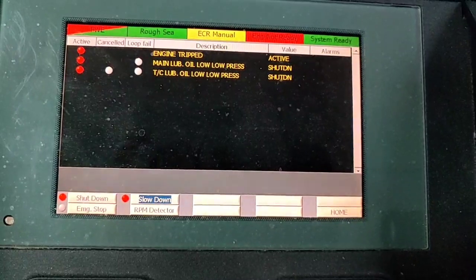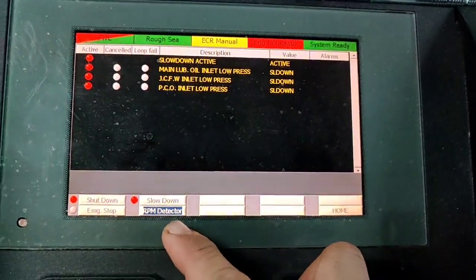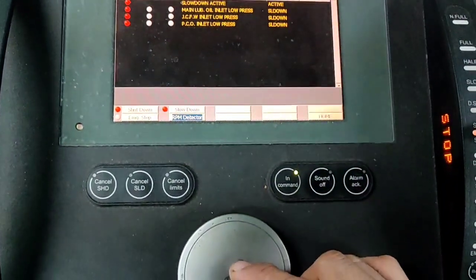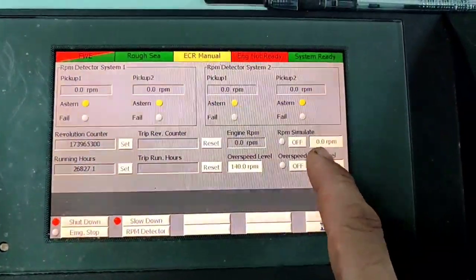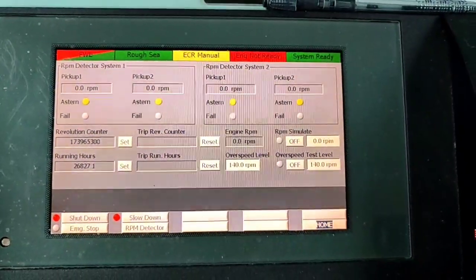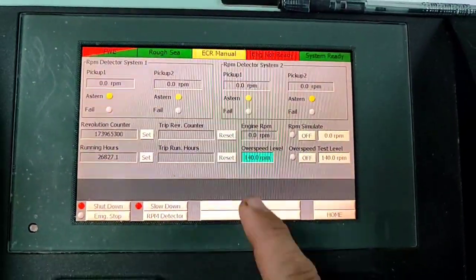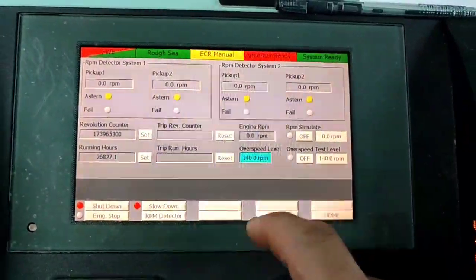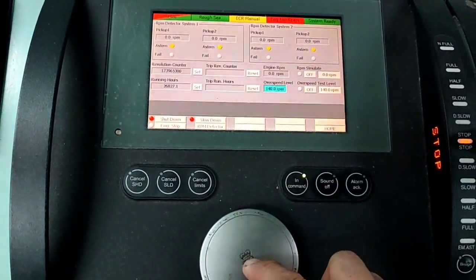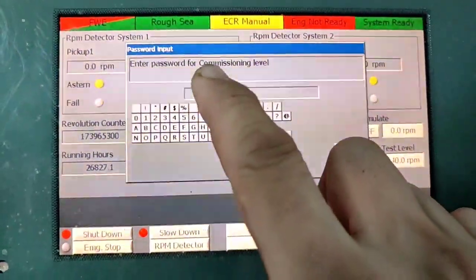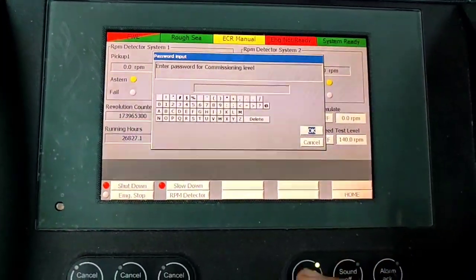Today our engine is stopped, but you select the RPM detector menu. After that, there is an RPM simulation over speed test level. The over speed level — for example, 140 — that is the set point for our over speed setting. As you can see, press enter and we need commissioning level.